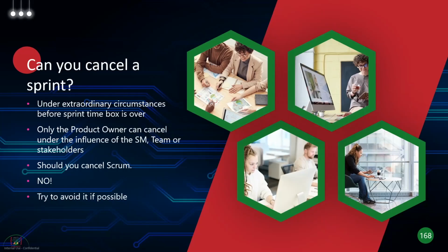So let's say the demand for the product has changed, the market conditions have changed. You might have to cancel a sprint. You don't have a way out. However, it's best not to cancel a sprint. Try to avoid it like the plague. Don't cancel a sprint if you can.